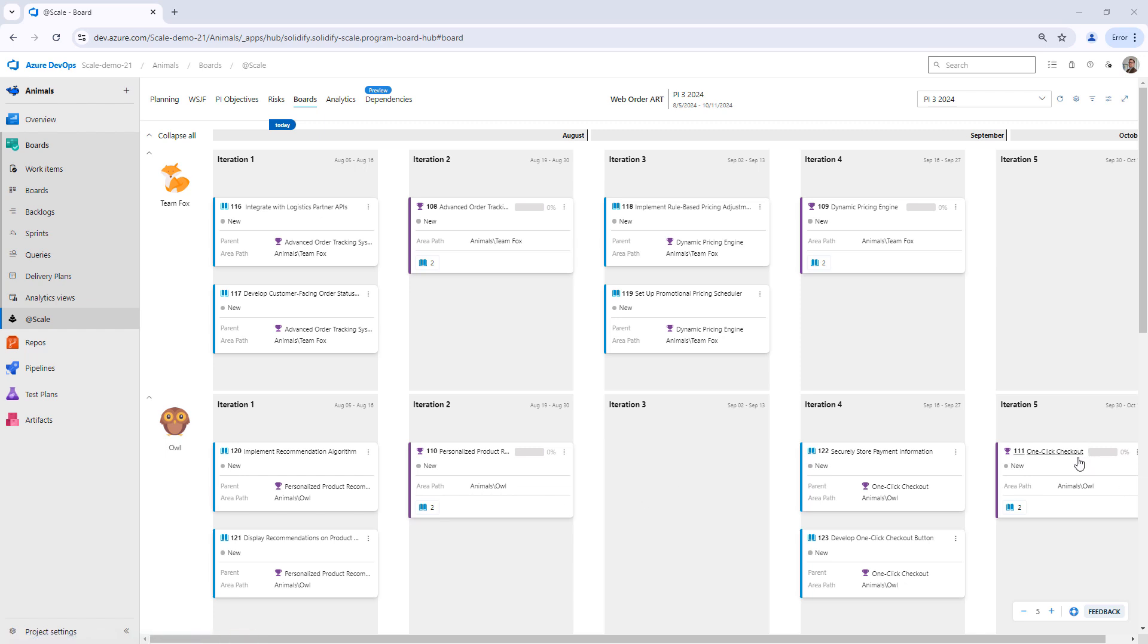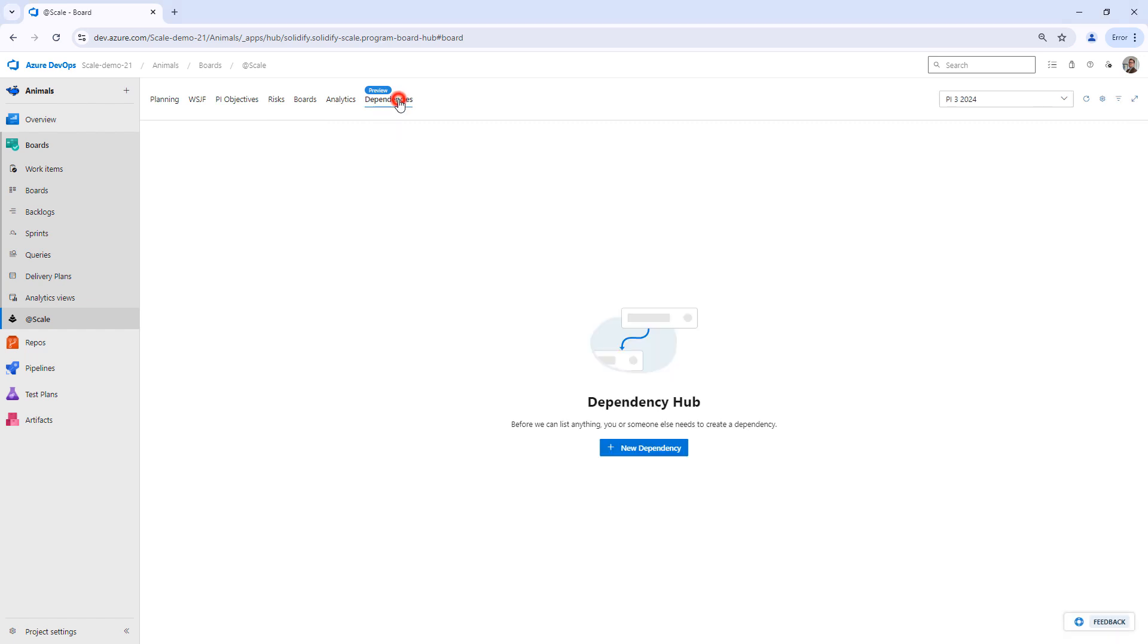Team OWL is currently planning for one-click checkout and they just realized that they need secure payment storage, and they want to ask if Team Fox can help with this. With the addition of New Dependency Hub, we can now send a request and ask Team Fox to help.